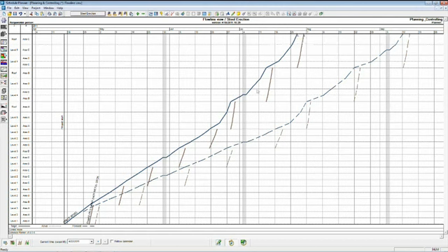And we probably, if we can, need to ramp up our steel production and make sure that we can put enough guys on this task to recover this time. Now, the one factor that we didn't consider yet is whether or not, we know we're not meeting production. We know we're not meeting planned production.